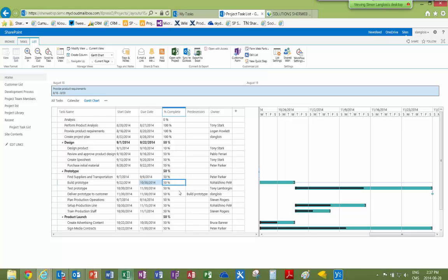Don't forget that SharePoint is web-based. So the internet, your browser, doesn't know the relations and will not calculate everything continuously. It's going to be too time consuming or CPU consuming for your server. So it's not like Project. Project is an application, and when it gets too slow, you're going to deactivate the automatic calculation. And when you want to calculate the different dependencies, you're going to hit the button and it will calculate it. So you don't have this notion in SharePoint.